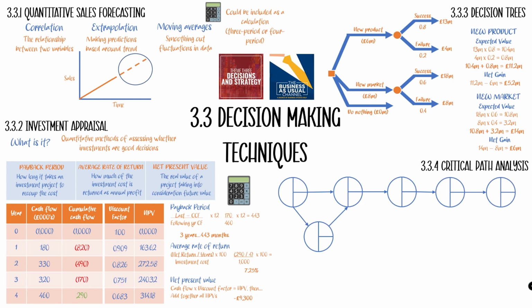There's a series of circles, a series of lines. The key thing to be aware of here is that the activities are the lines, not the circles. And that's one of the most common mistakes you see in the critical path, when people are starting to be introduced to it. They think that the circle is the activity. The circle is the point between the activities, or before and after an activity.